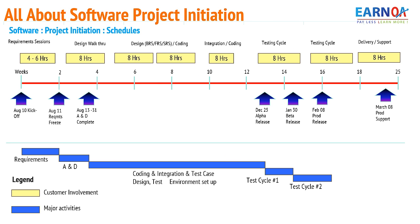The model explains the exact schedules: initially we spend 4 to 6 hours per day for 1 to 2 weeks on requirement discussions. Then about 8 hours to understand and design the complete documentation. From week 5 to week 10 or 12, we start designing the code, documentation, and integrating the code. Once done, we deliver the project to QA, who performs smoke, functional, integration, system, and regression testing. Once everything passes, at around week 18 we are ready to deliver the project to the customer.